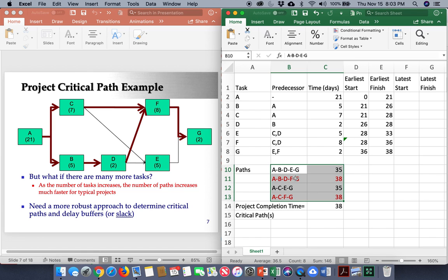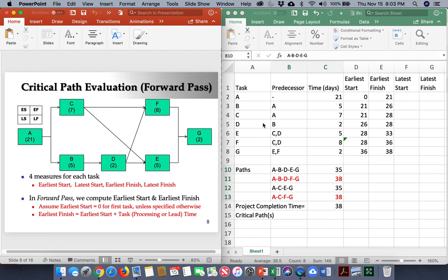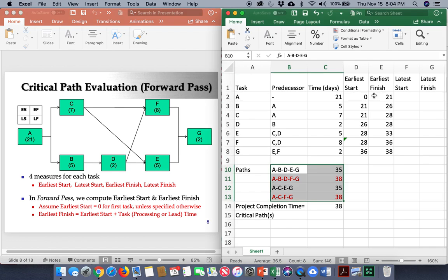And so in this approach, the critical path method, also called the CPM method, this algorithm, you just have to do two computations per task. And so no matter how many tasks you have, you just have to compute 2 times per node or per task. And so this is actually linear growth in the computational effort. And so that makes it much easier, much more manageable.